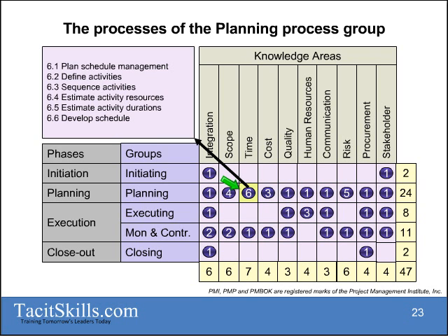And that schedule that I'm developing, initially it is normally a network diagram. Then when I allocate the resources to them, and I also take into consideration the working hours and the non-working hours that I've got on my project, I will develop a bar chart type of schedule.